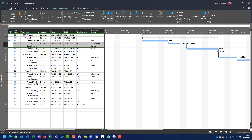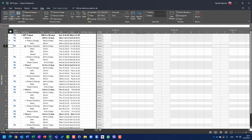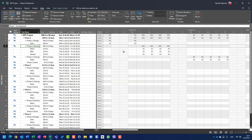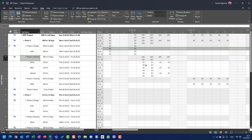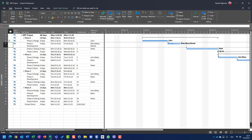For example, if we have Phase One Development — four days — for Ellen, Mary, and Nenad, and I put 50% here, let's go to View > Task Usage and scroll to see this task. If I right-click and add actual work, I will see that 50% is done by Mary, Ellen, and myself. Let's go back to the Gantt chart and set it to zero.